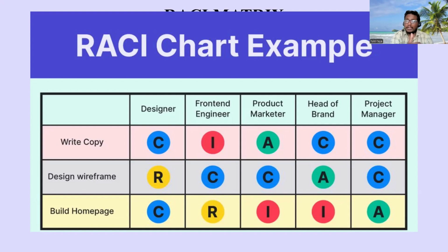Because he can give some inputs, since he is developing the particular screen. Product manager also should be consulted, head of brand is accountable, and project manager is consulted, right? You understood the use case, right? Who is consulted, who is responsible, who needs to be informed.